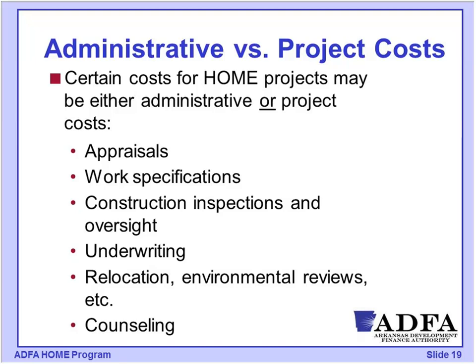If I'm tracking my time specifically to that address, then that could be eligible to be charged off to the project. So I would have to have a timesheet that showed, for each of my days, I was on site at a particular address, and so charging off that time, I would be keeping track of when I return to the office, if I'm spending some time working on developing those work specifications.